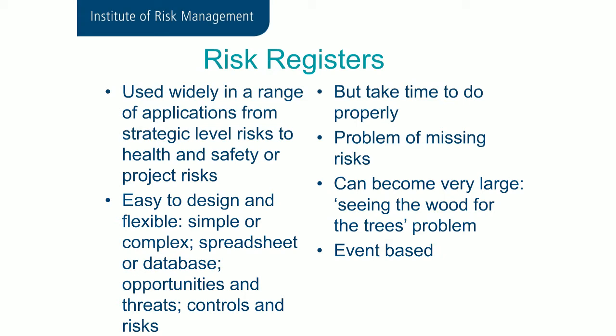Of course, there are companies out there that offer more sophisticated versions of risk registers using a variety of databases. They may not quite look like a risk register, but they're still effectively doing the same thing. They're still collecting information on the level of exposure, so the probability and impact of a risk, possibly both on an inherent, without controls basis or a residual, with controls basis. They may be collecting information about controls and the effectiveness of those controls, probably identifying risk owners and possibly even including action plans and all sorts of other things. But one risk register in one organization may look very different to another organization. So they can be very flexible, very easy to design.